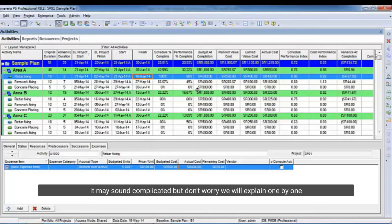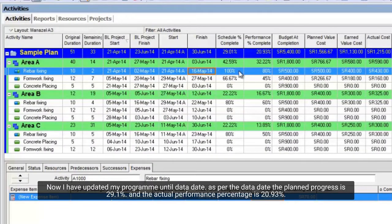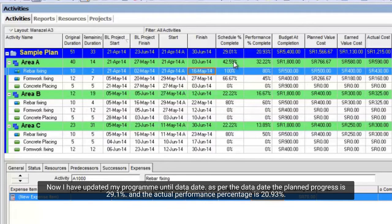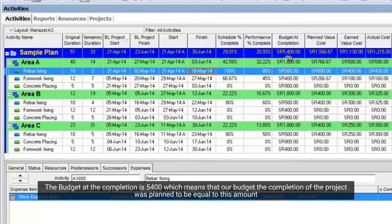It may sound complicated but don't worry we will explain one by one. Now I have updated my program until data date. As per the data date the planned progress is 29.1%, and the actual performance percentage is 20.93%. The budget at completion is $5,400 which means that our budget the completion of the project was planned to be equal to this amount.